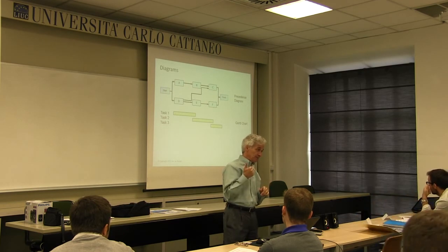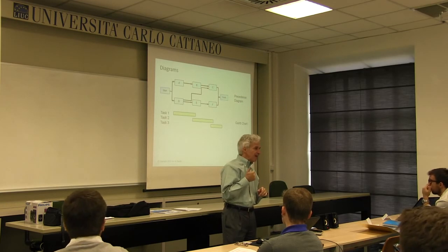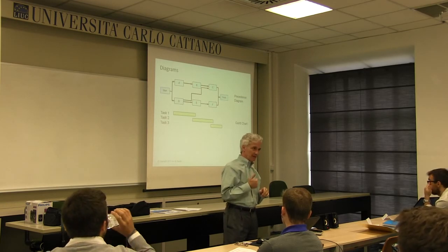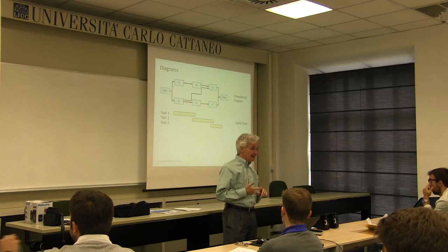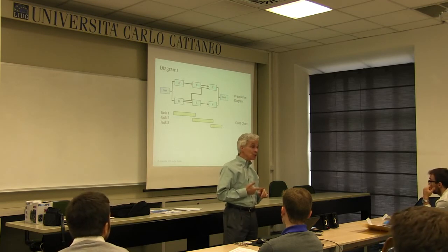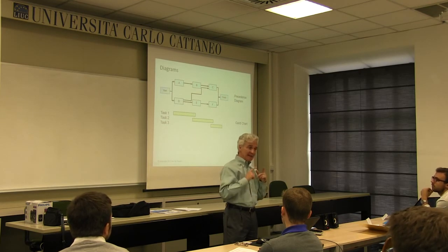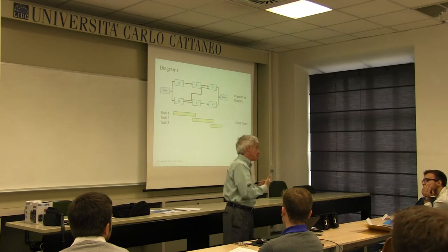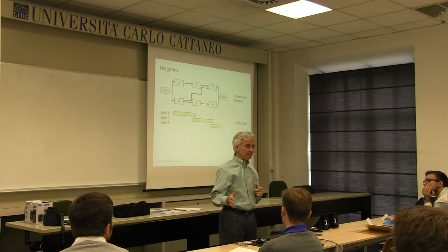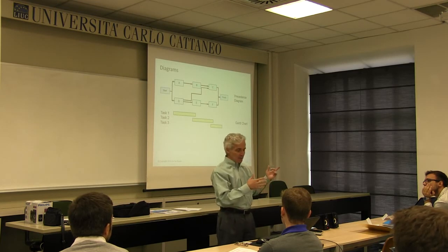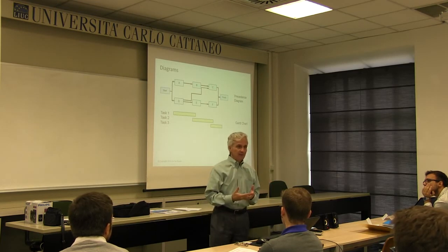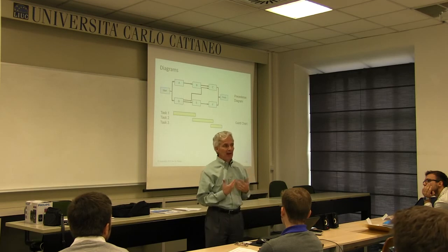By the way, a schedule is not a plan. A schedule is one element of a plan. And a Gantt is not a schedule. And it's certainly not a plan. A Gantt is a visual representation of part of the schedule. But very often in life, people refer to a Gantt as my plan.